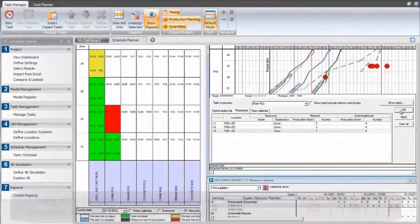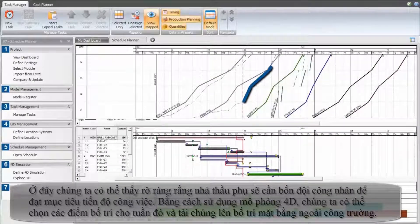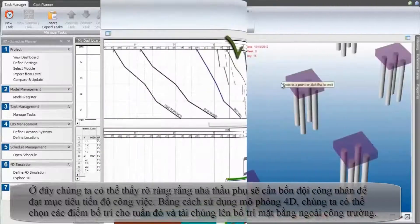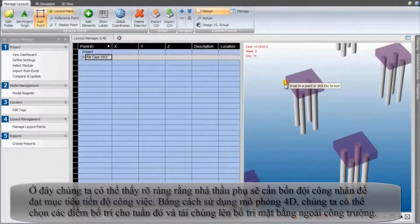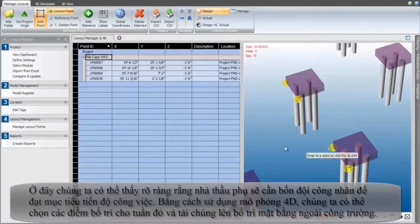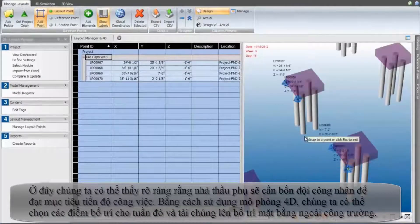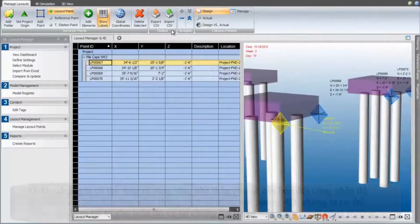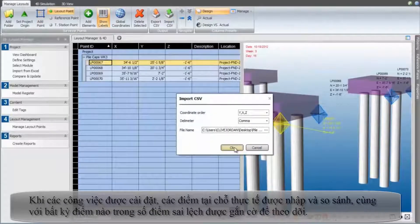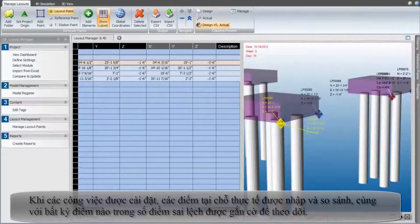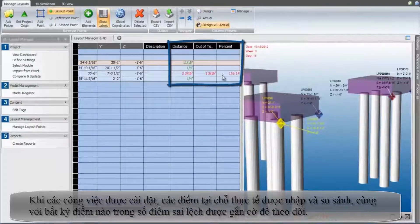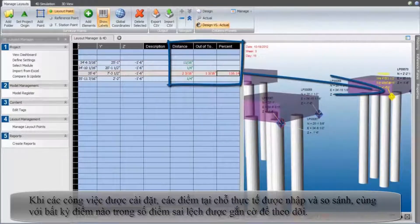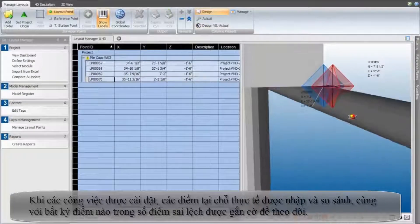Here we can see clearly that the subcontractor will need 4 crews in order to stay on target. By playing the 4D simulation, we can select the layout points for that week and upload them to the total station for the layout in the field. When the work is installed, the actual in-place points are imported and compared, and any out-of-tolerance points are flagged for investigation.